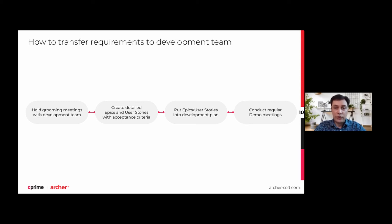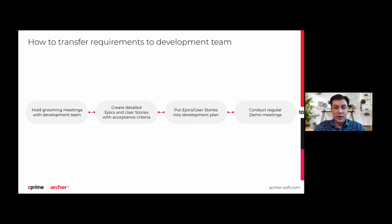Then, put epics or user stories into a development plan to negotiate the time schedule of development and receiving the first results. And of course, from the client side, it's important to have demo meetings to make sure the development team understood and implemented requirements correctly. Together with that, at this stage, some additional requirements could be created, because after implementation and visualization, we may realize something needs to change.